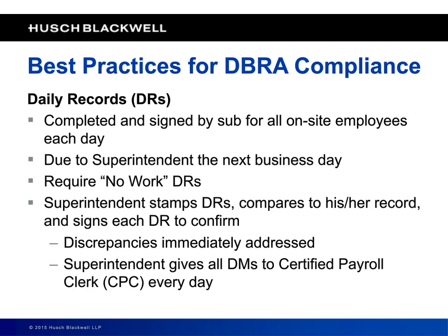Make the sub submit a record showing who was there and how many hours they worked every single day, including if they don't work or had nobody on the job that day, make them submit a record saying no work today, and sign it and send it to you.